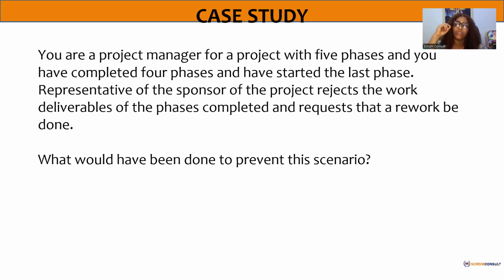One way of determining your budget is through what we call bottom-up estimation, and you need your work breakdown structure to be able to aggregate. We'll do that in cost management. We have other ways to look at cost. Either you do bottom-up estimation, or analogous estimation or parametric estimation for your project budget.